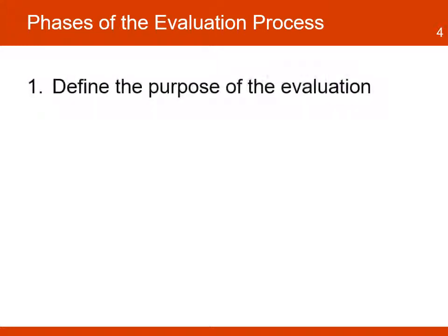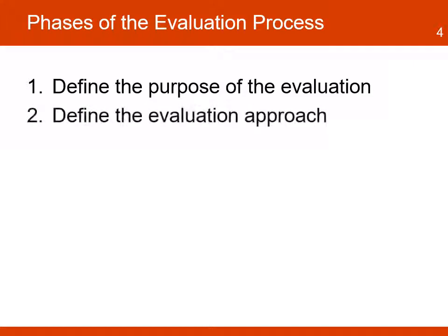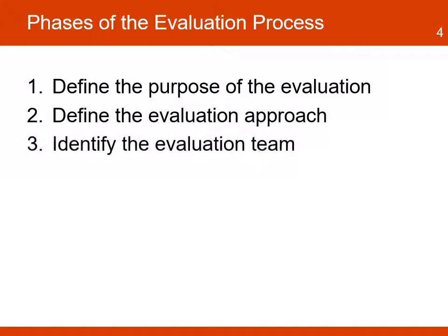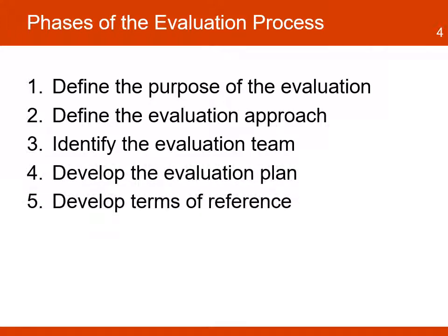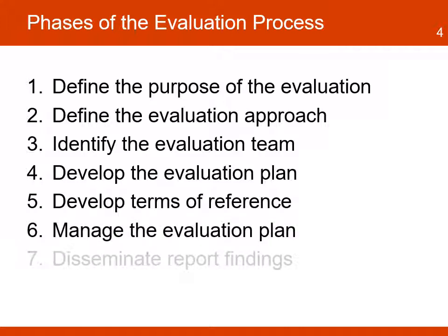Define the purpose of the evaluation. Define the evaluation approach. Identify the evaluation team. Develop the evaluation plan. Develop terms of reference. Manage the evaluation plan, and disseminate report findings.